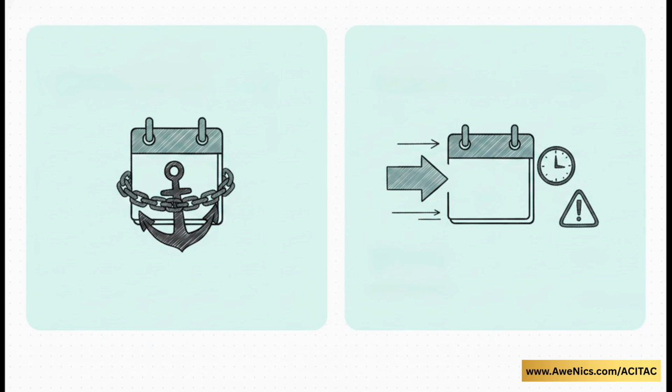However, your current schedule, which is that living, breathing document that you're updating every day, that one will shift. You just jump in, add a note or a new line item explaining the local issue that caused the stoppage. Boom! Now your current schedule clearly shows the delay and how it pushes back your finish date. But your baseline stays perfectly put to remind everyone what the original plan actually was.